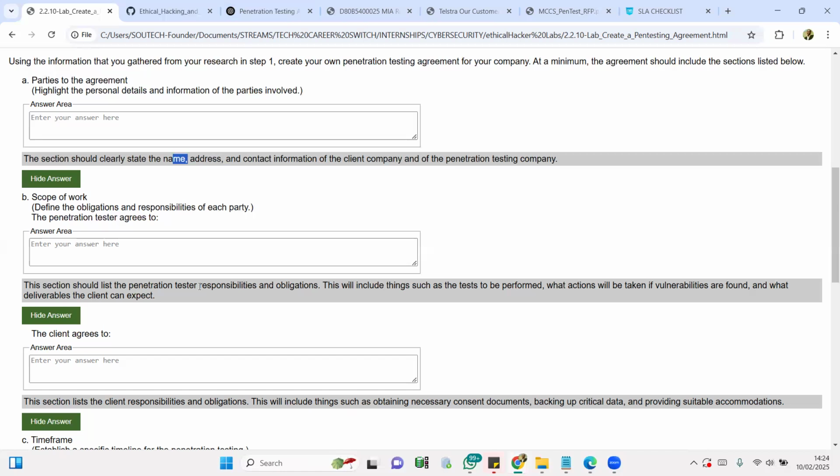They have some handheld devices held by some staff spread across different parts of maybe the city or whatever. And you're meant to also test for vulnerability and maybe conduct some testing on that. You see, now your scope of engagement has actually gone beyond the initial thoughts you had.